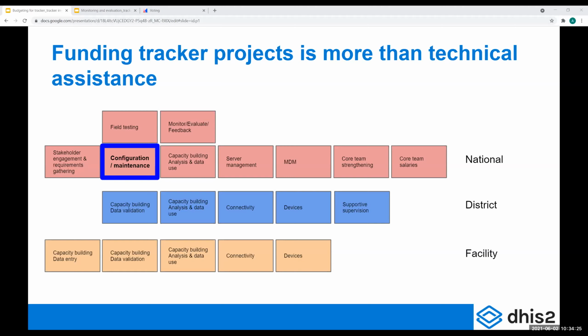Yeah, and we have Abdul here from Afghanistan also making a valid comment, saying that it's important to know who is asking for the system. If it's coming from the leadership, they often also sit on the money, so there will be willingness to have sufficient budgets for all the boxes for the long run. But if the idea is pushed by lower level people, then there are hurdles.